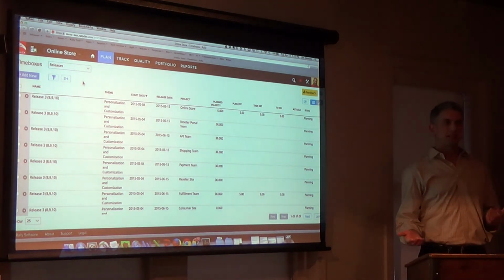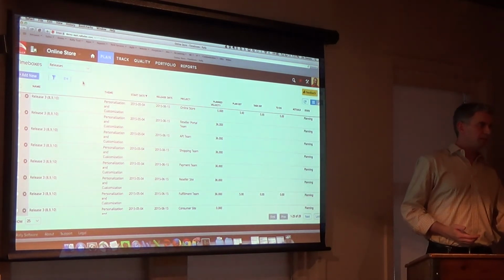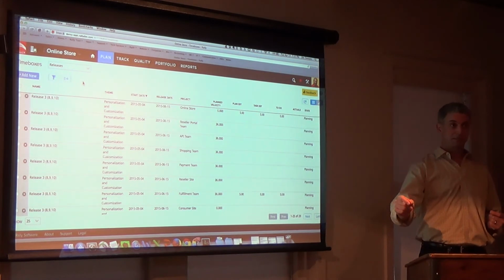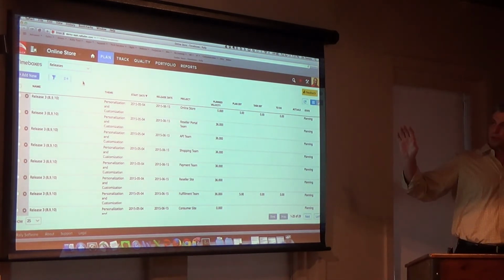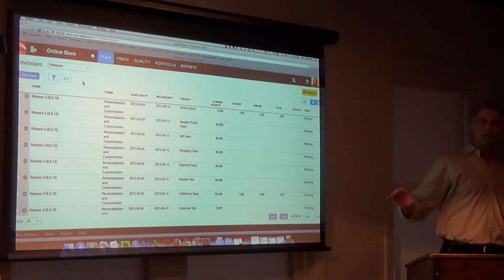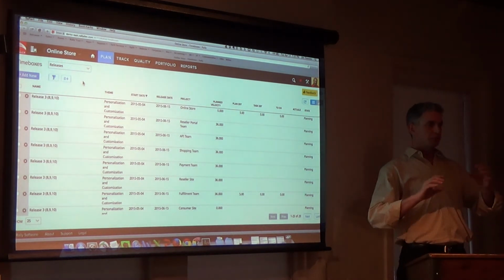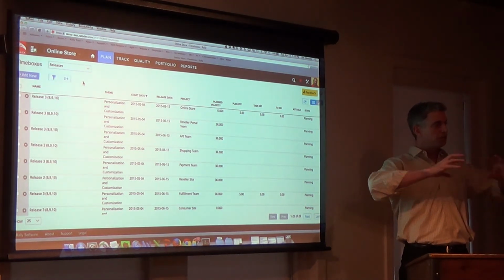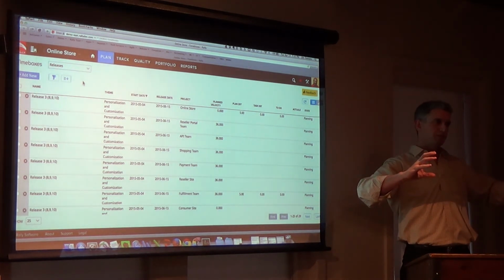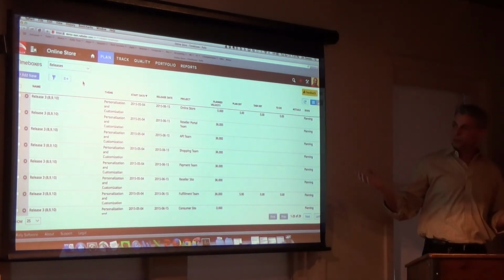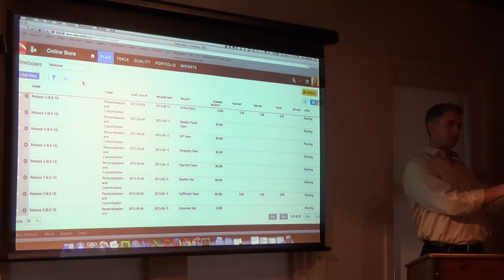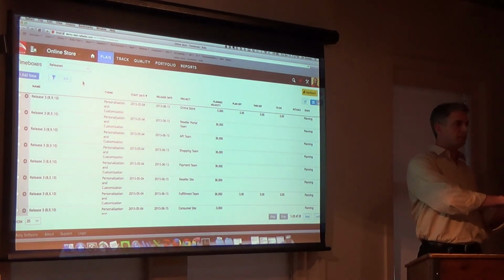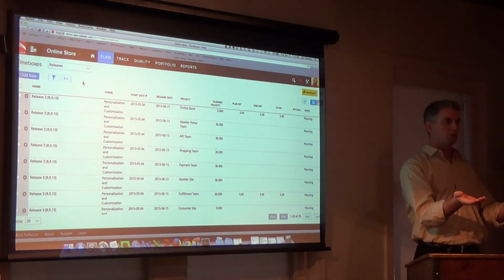Well, nowadays we have things like the cloud. We have internet applications that we deploy from central IT. We have the ability to put things out a lot faster. And so the modern approach with Agile has been to stop thinking about a release as some sort of major event that happened once every 2 years, and start thinking of it as just a larger time box than a sprint or an iteration. What Rally coaches is sprints for 2 weeks, releases for a quarter, or 90 days. So you can fit about 6 sprints into a release.